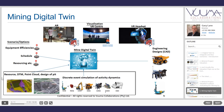As the project progresses, engineering CAD drawings can be included, ending up as a proper 3D design. This exposes management and the project team to the ability to run scenarios in the digital twin — testing different equipment efficiencies, changing the mine design, production schedule, resourcing assumptions, and maintenance strategy — to see the impact on every single activity. The digital twin can then be viewed using augmented reality with Microsoft HoloLens, virtual reality at the University of Pretoria's state-of-the-art center, or VR headsets like Oculus.